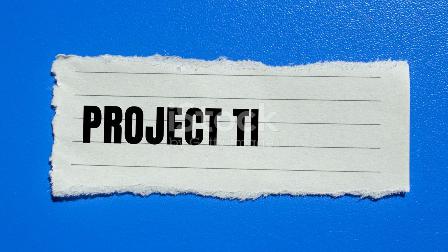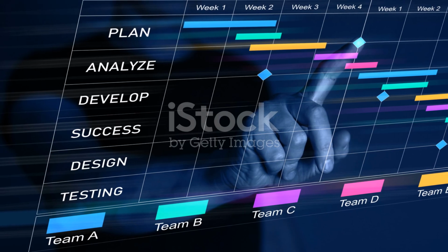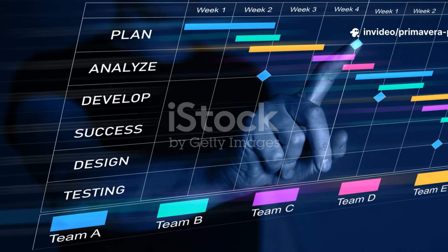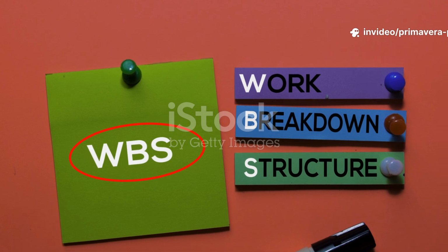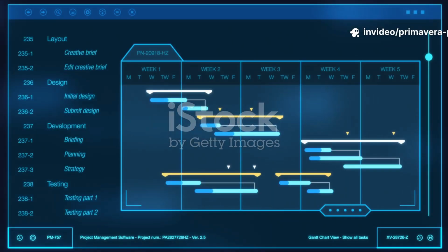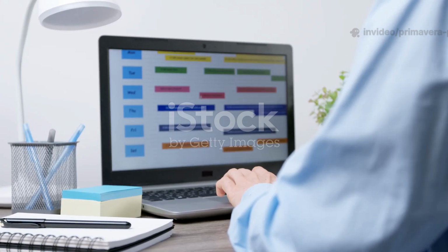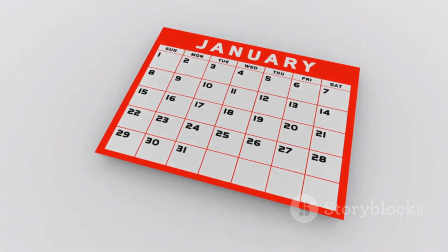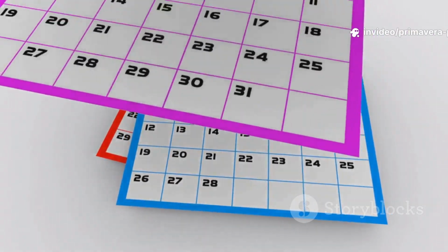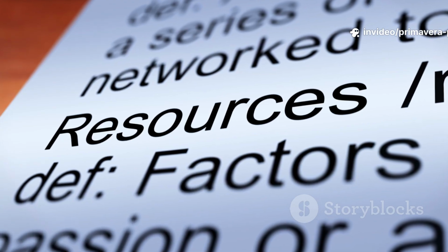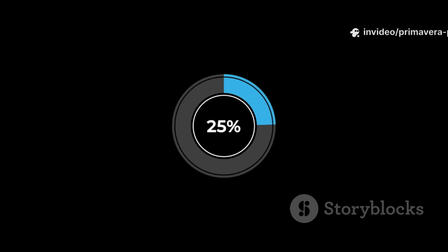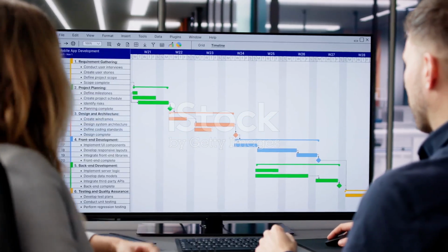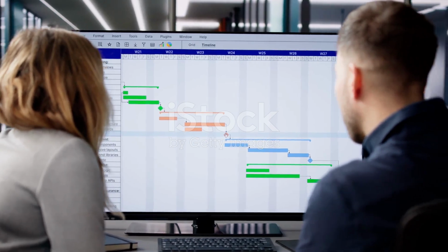Primavera P6 complete workflow. Create a new project, set up ID, name, and dates. Define WBS: break the project into phases and activities. Add activities, assign IDs, dates, and types. Define relationships: finish to start, start to start, finish to finish links. Assign calendars, working and non-working days and hours. Assign resources and costs, automate cost tracking. Schedule the project: press F9 to generate the timeline. Analyze the critical path, identify tasks you can't delay.